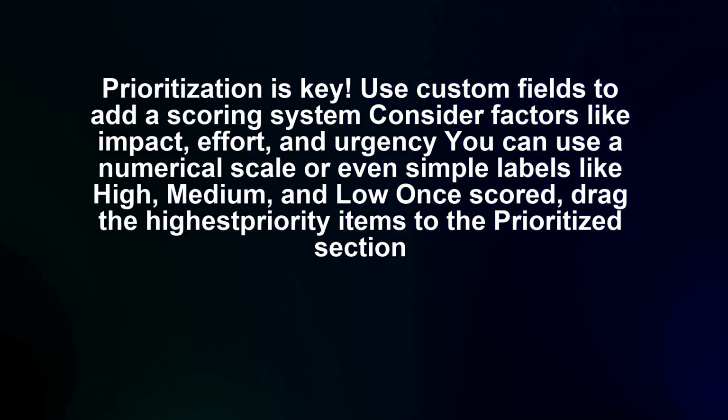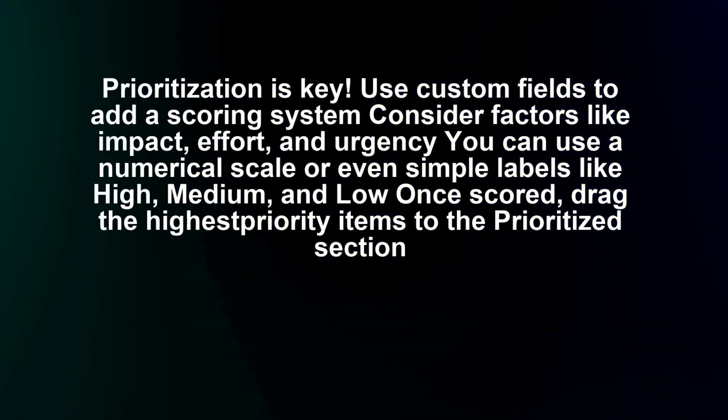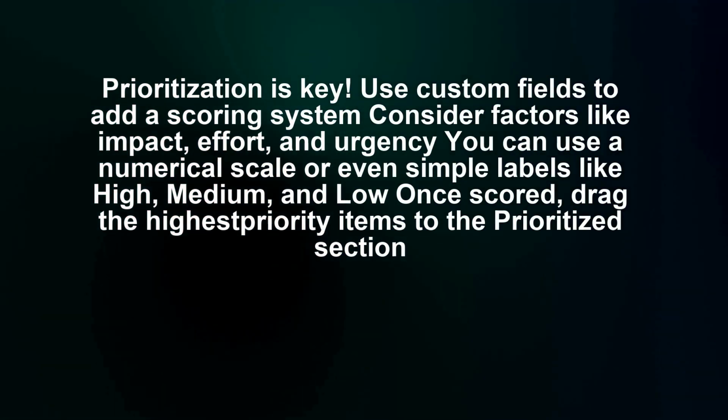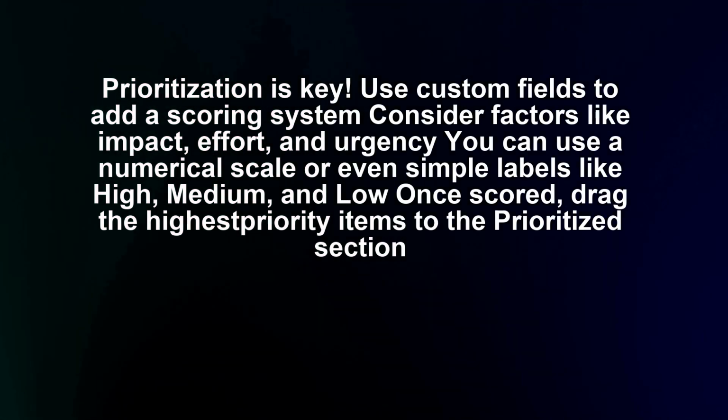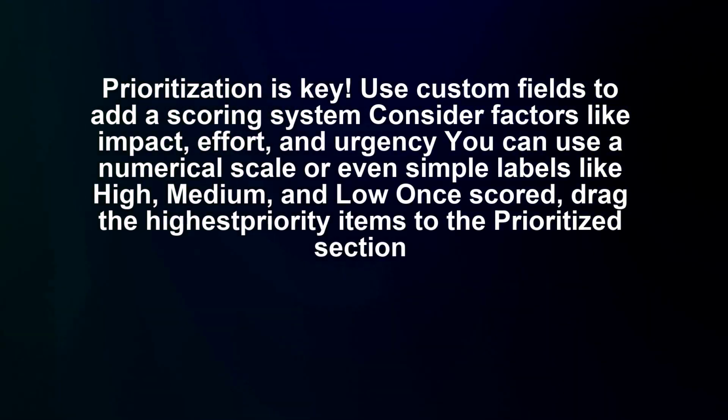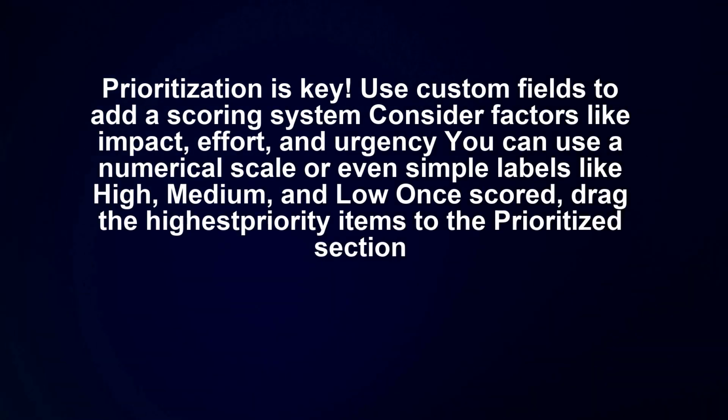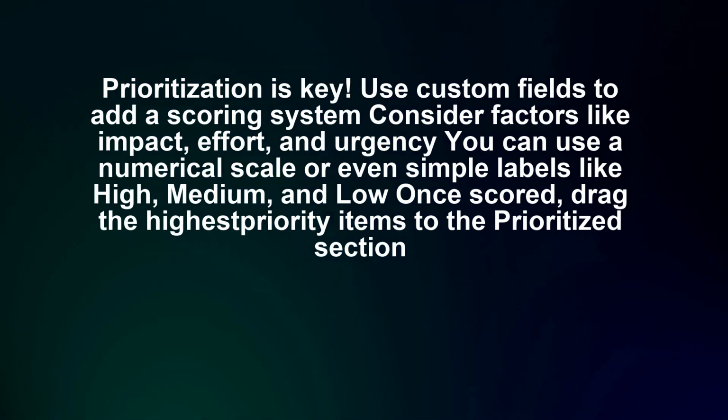Prioritization is key. Use custom fields to add a scoring system. Consider factors like impact, effort, and urgency. You can use a numerical scale or even simple labels like high, medium, and low. Once scored, drag the highest priority items to the prioritized section.